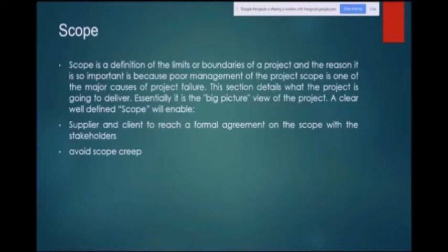Then finally they will come out with, this was expected from you, this was understood, why, how can you do this, I need this, without which I will not pay you. The problem is that, so to avoid all these conflicts and problems in future, we must have a document and we must create a scope. We should not go by the face value.